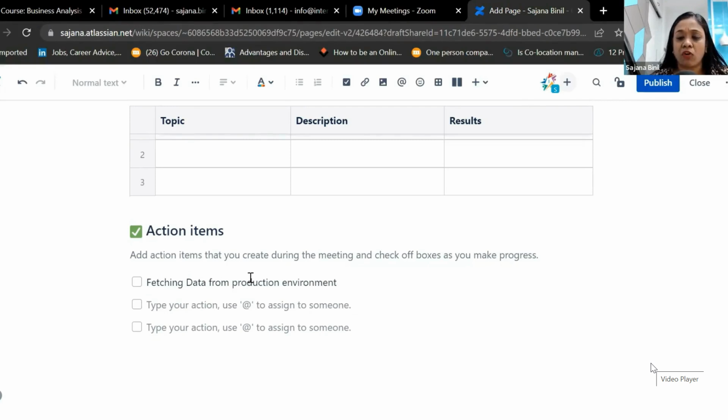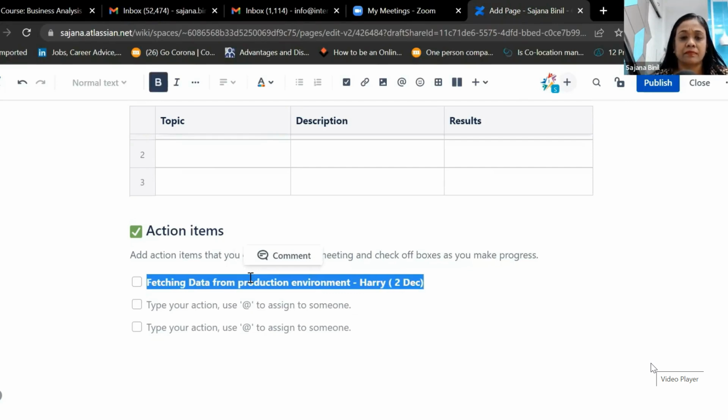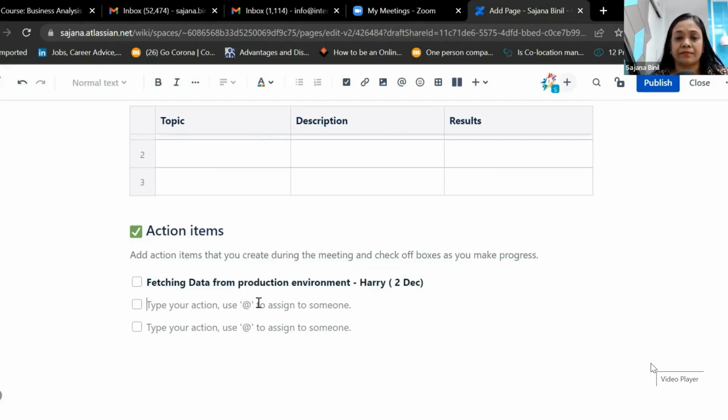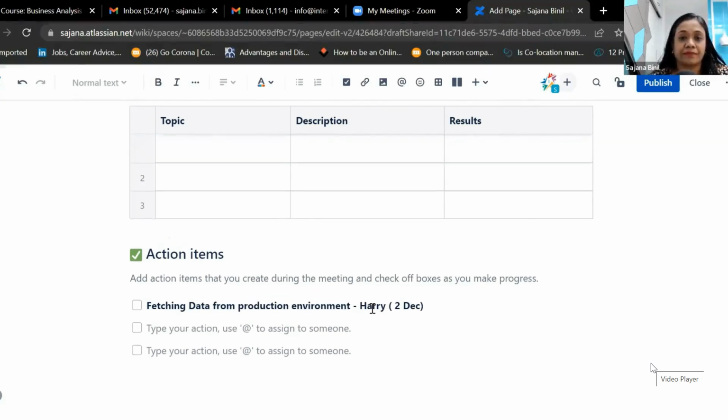One of the customers agreed that he will be providing this in the next 2 weeks. So I give a date to that, say 2nd December: data to be provided by 2nd December. And I mark it as an action item. Whatever is an action item on myself, something I had to check with my technical team and get back on, I should add that as an action item with my name against it.